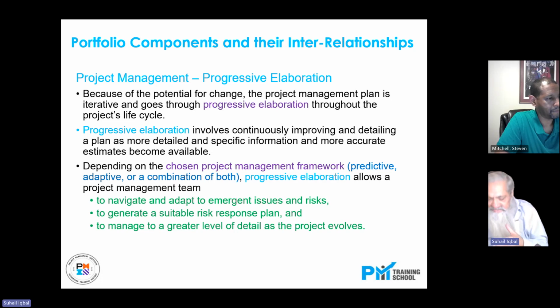If there is a lack of information at the tactical level, and we don't know specific information about something, we start planning around it, leaving that as a black box, and we can fill in the blanks whenever the information becomes available. That is called rolling wave planning, right? Although this concept is the same, it is at a tactical level, and progressive elaboration is at the strategic level.